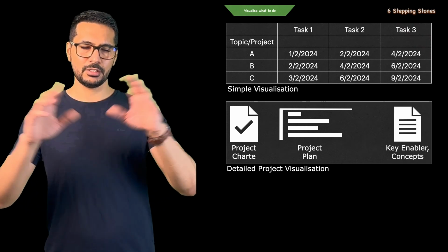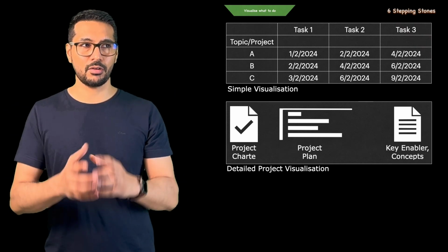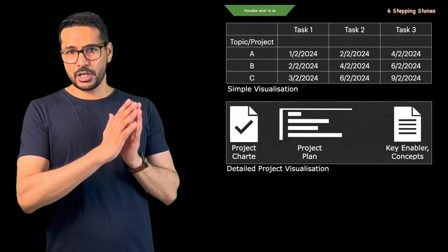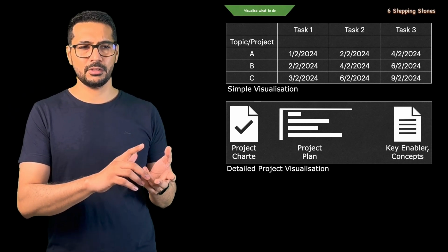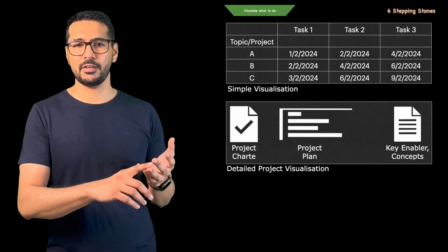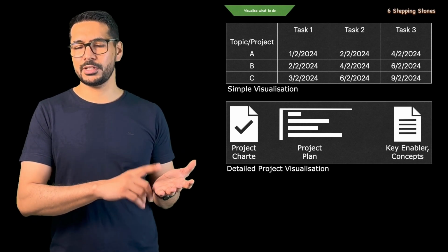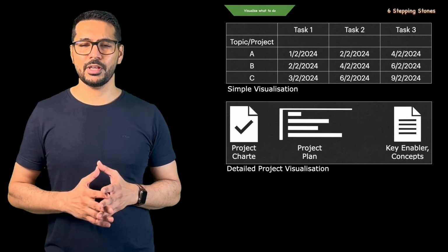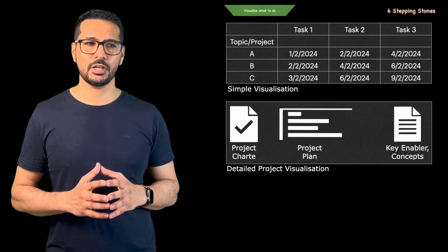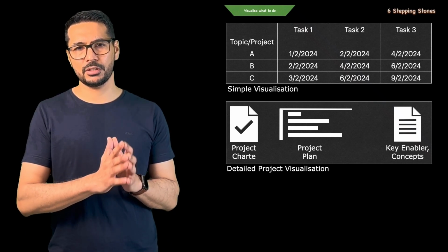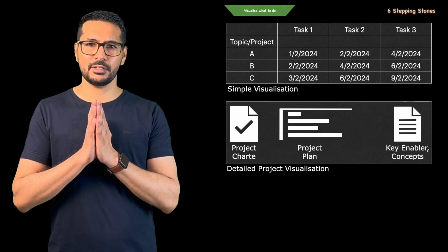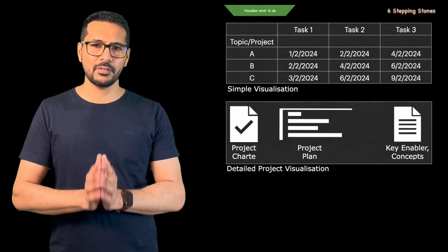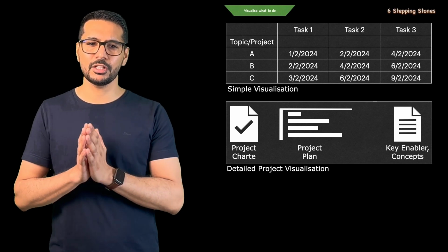the project charter, in which the goal of the project, the resources, the team and time frame, cost, budget, stakeholders, everything we have can be displayed, so that we always have a clear picture of what this project is all about. And then we can have the time plan, showing what the activities to be done are and by when they should be done.